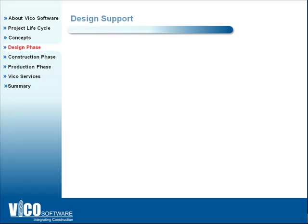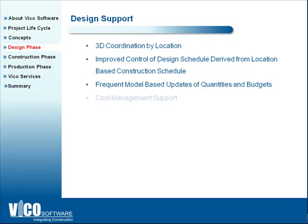The low-hanging fruit in the design phase is 3D coordination. A lot of companies already use building information models to coordinate different trades in three dimensions, and most companies, when they say they use BIM, typically mean 3D coordination. However, in the VICO process, you also add the ability to manage cost and set targets. Value engineering becomes a different concept — today it often means taking the design and removing the valuable parts to reduce cost. But when you have an integrated system monitoring cost and changes throughout the design phase lifecycle, value engineering truly becomes value to the owner and value to the team.